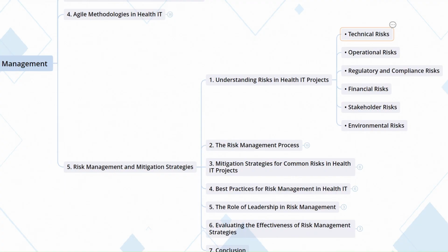Firstly, technical risks. These involve challenges related to the technology being implemented, such as integration issues with existing systems, software bugs, data migration, and technology failures. Next, operational risks. Risks that impact day to day operations, including workflow disruptions, resource shortages, or changes in staff roles due to new technology.